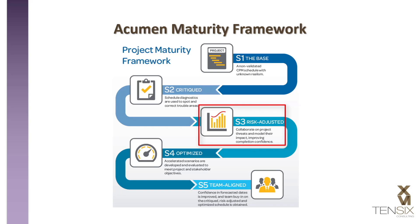S3, risk adjusted. The uncertainty of duration and cost estimates are considered. Risk events including both threats and opportunities are identified. A risk event can be positive — something good that may happen to your schedule that decreases the duration and/or cost. The exit from this stage is a realistic schedule outcome.